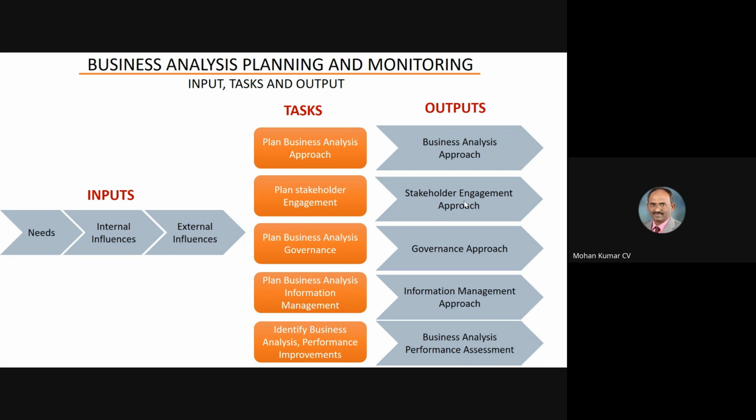See, if you look at what I told you, when I take a business analysis approach, the problem is how do I elicit the requirements. Number two, how do I document them? How do I get them signed off? These are all the tasks I have for business analysis. Now, if I go sequentially, it will take time. So if I put somebody on the elicitation part, and somebody else can do the documentation at the back end, things will become faster. Yes or no? Yes. That's how you can do it.